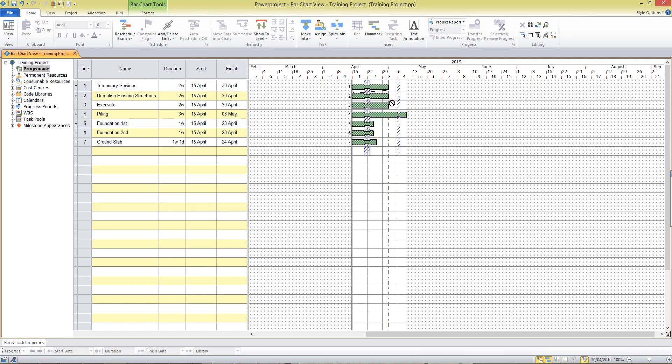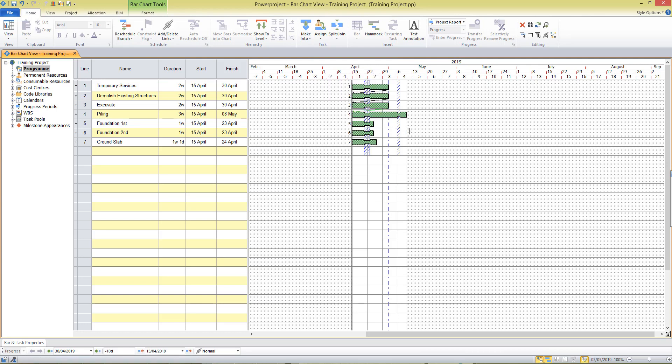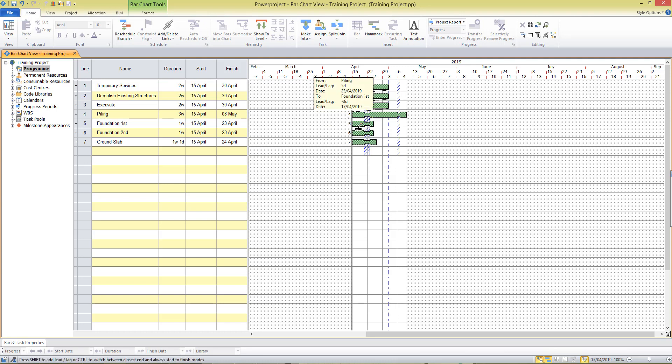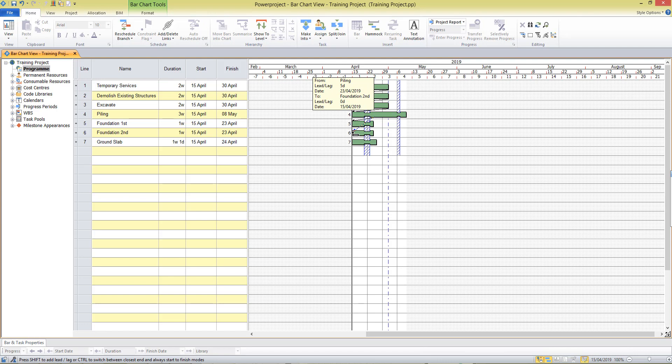So we position our cursor and we click and drag to draw the link to the next task in our project. We can also draw mid-links so I may decide that one week into the piling activity, that's five days, I'll drag and draw to start the first foundation task. So we're placing our cursor along the bottom of a task without clicking and at the required duration we can click and drag to draw the link to the next activity.